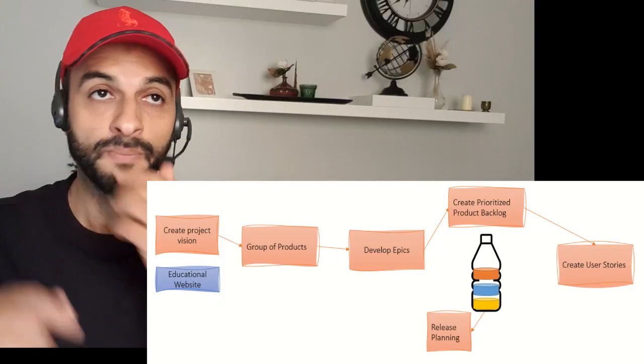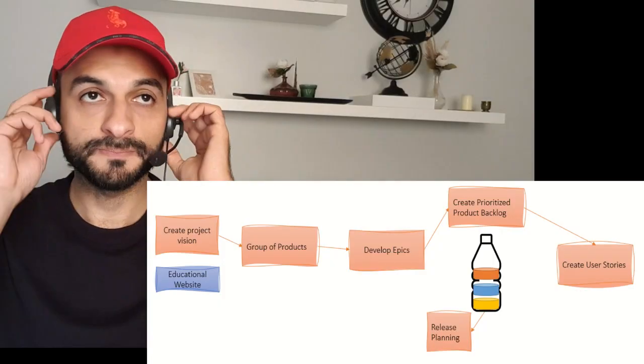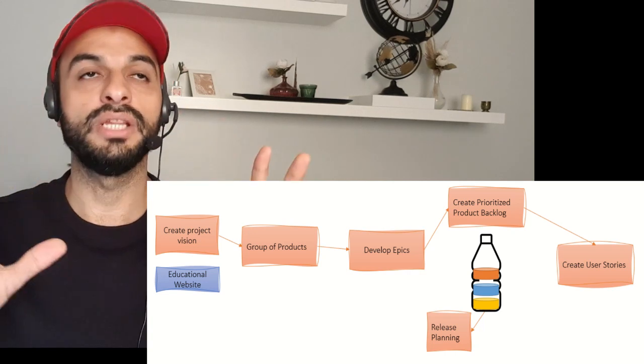In the waterfall, you plan everything, and after planning everything, you start executing everything, which is not here in the Scrum. In the Scrum, you divide the products. You start with one product, you say, fine, let's have some user stories. And user stories here means, in order to create product number 1, what is the content of the work in this product, and how can we make it simple for the programmers team.